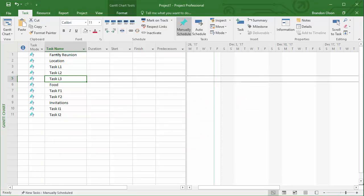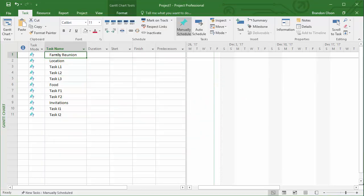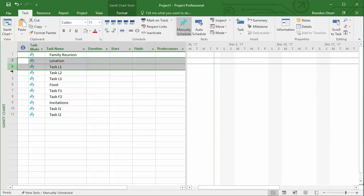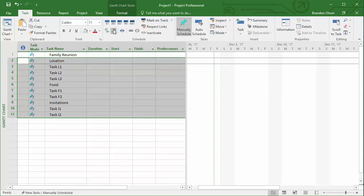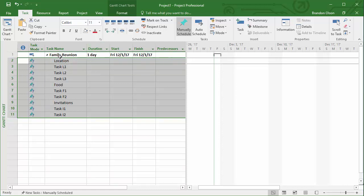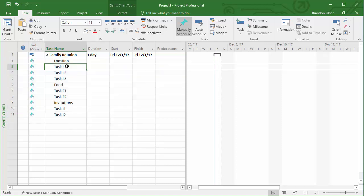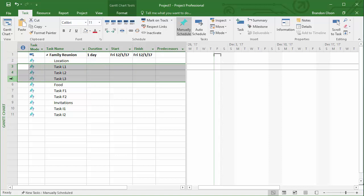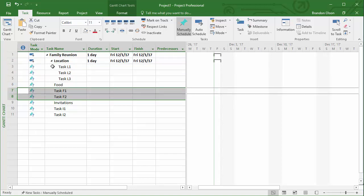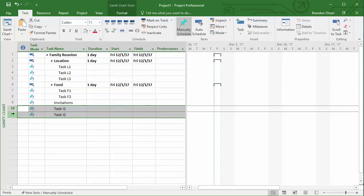With the family reunion at the top, we will select all the other lines after that and indent them so that they all are a subcomponent of family reunion. And then we say that task L1, L2, and L3 represent the individual tasks for the location part of our project. We're going to highlight those three and then indent those and do the same thing for food and invitations.